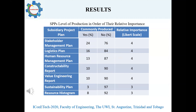Here we have a few more of the subsidiary project plans and their relative importance. A plan such as the value engineering report, rated at level four — important — is only commonly produced at 10%. These numbers confirm that regardless of the high importance of all these plans, the required level of production for the success of our projects is being neglected.